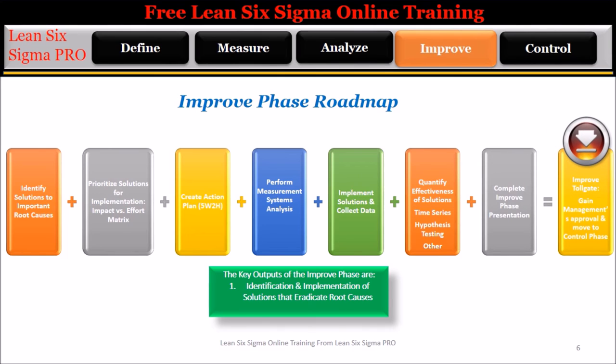Step 8: Improve tollgate — gain management's approval and move to the control phase. The key output of the improve phase is: 1. Identification and implementation of solutions that eradicate root causes.